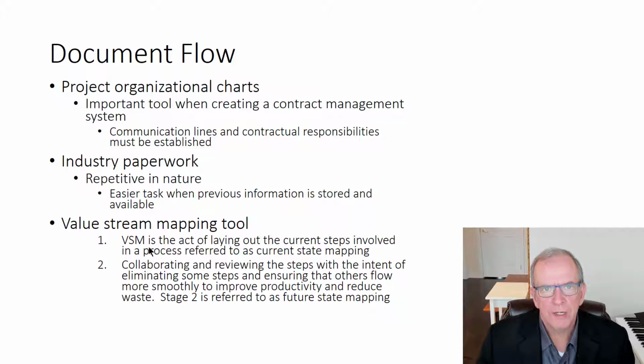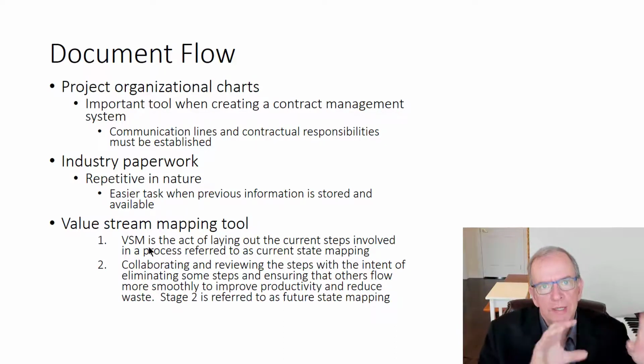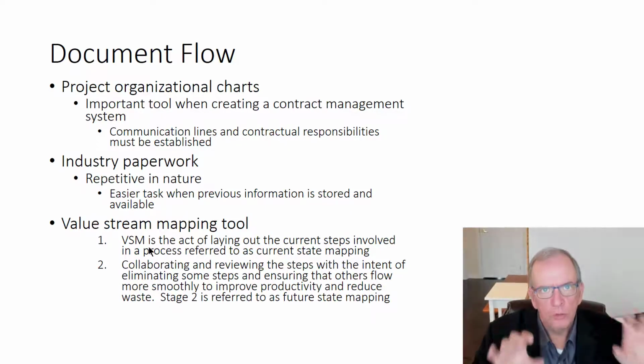There's been research studies on real projects that have been done in this particular area in lean construction to look at how do we shorten the change order process with this government agency. So maybe you have a government agency where the bureaucracy is so large that a change order takes months to process. And that's obviously going to have huge impacts on construction projects. And so you do a value stream map of why is this taking so long now? And then what can we do in this map to actually shorten it?